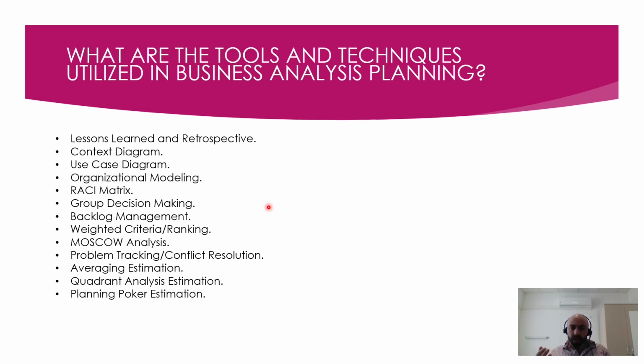One of the people present in that meeting will read a story and count to 3, where everybody will open their cards and estimate that user story, right? And the cards are based on a Fibonacci series. I don't know if you guys remember the Fibonacci a little bit.